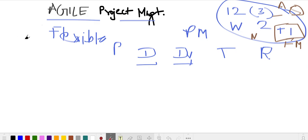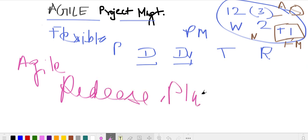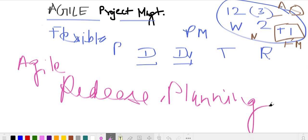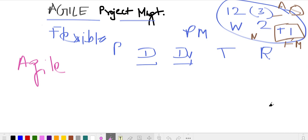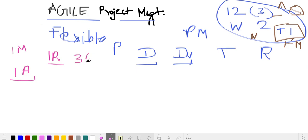We distribute these into release planning — agile release planning. If you are a project manager you should be very familiar with this term. What we exactly do in agile release planning: the project manager does the planning and says, 'We are in March right now, let's do the first agile release on August 1st.' Our first release delivers three pages which are for iPhone 12.